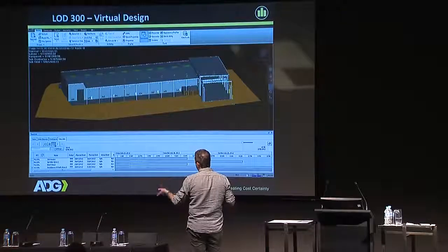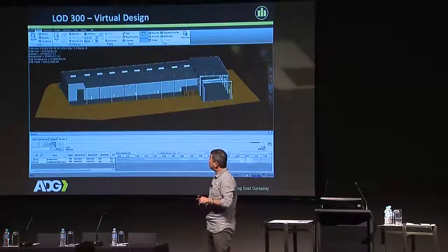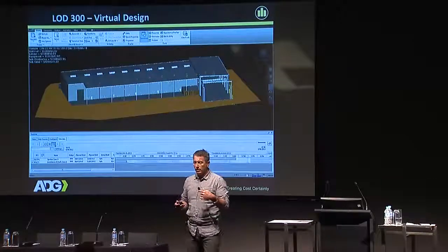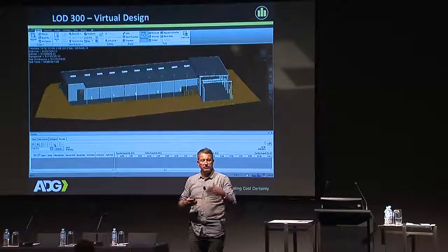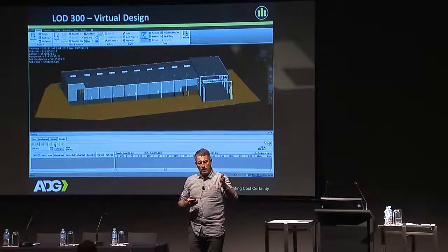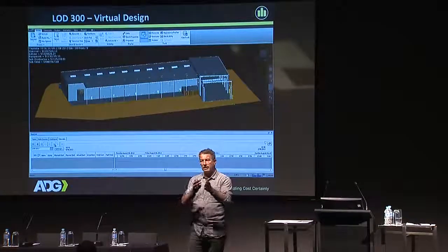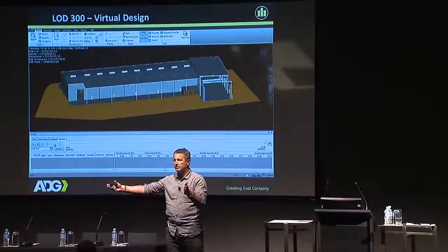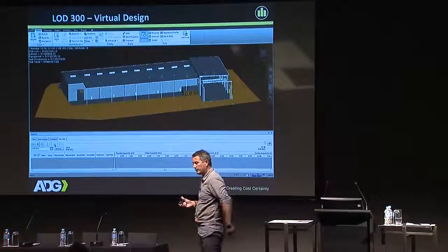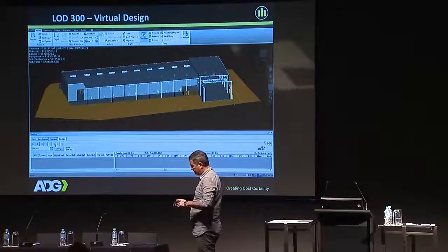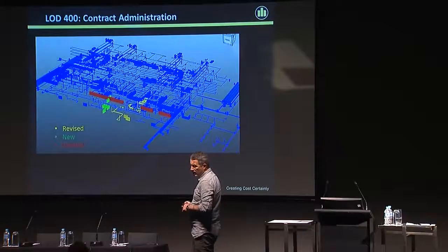Work that we did outside of this was for a structural subcontractor where we'd linked that information together with his general ledger. So we were monitoring the cost he'd incurred to date, and then forecasting the amount of work he had to complete to start pitching at where this project was going to be in an outturn cost for him, whether it was going to be profitable at the end of the day.